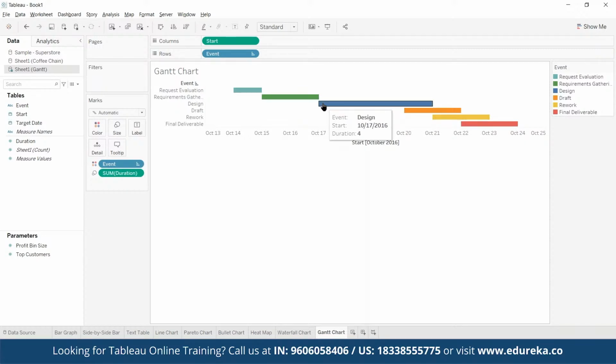Then we start with the design document. How do we plan to approach each requirement? What are we going to create for it? Now we are not going to wait to complete design phase to start with the build. Once you are halfway through, or you've completed 75% of the design, you can start off.